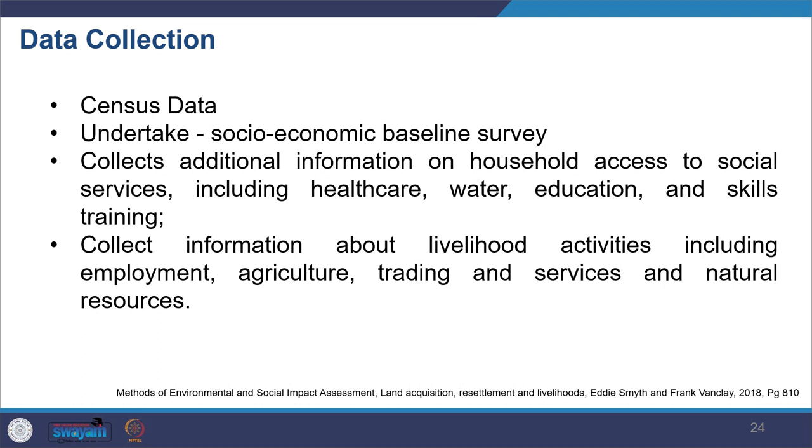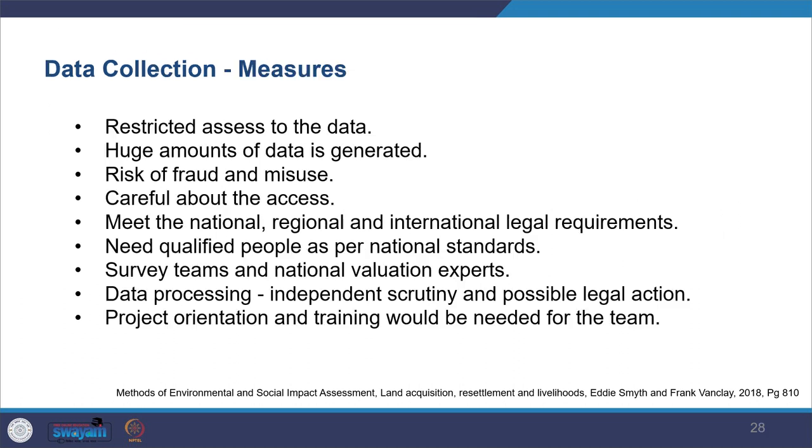Within this you look at whether they are primary, tertiary, secondary in nature, what nature of opportunities are there in that particular area. Further, when you're collecting these baseline data, you need to be very careful to have restricted access to the huge amount of data which you're going to collect, because there can be a lot of fraud or misuse of these data. And it might also create a lot of stress and tension at the later part. So you need to be very careful how much the data is shared and how many people have access to this. So you need to take care of that.